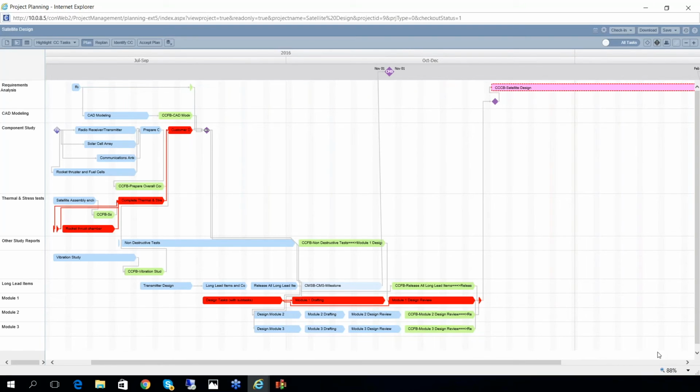Right. Again, what you see is the critical path, which is the red tasks, is 6 tasks. And by definition, again, this project plan is going to be much more stable. This critical path is going to be much more stable. And one more advantage you get out of all this is that when you reduce the number of tasks, you actually have a visual project plan that you can hang on your wall, and everyone can look at it and really understand what is going on inside a project.